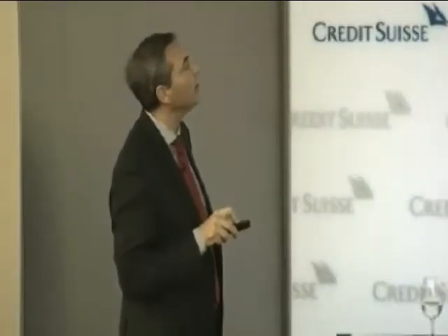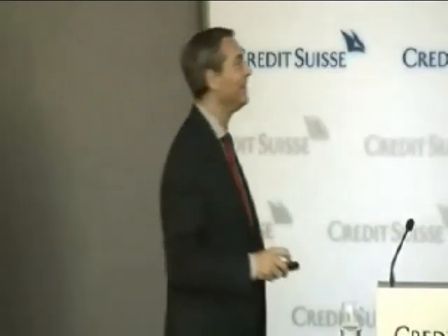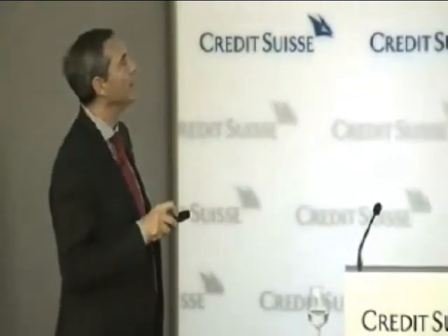In order to manage the risk, our transit updates the following documents: impact matrix, the risk register, potential risk schedule, development of final costs and risk potential. This is a real example, a real document of our transit, a real example of an impact matrix. Here you can recognize the risk 211. We said all the risks 200 are all the risks in connection with changes of the project. You can see the symbol, a circle means costs, and the other one, the timeline. Another real example of an impact matrix is this one. Here you can see the risk 121. It's a risk in connection with the land. And this is a risk in connection with the time.